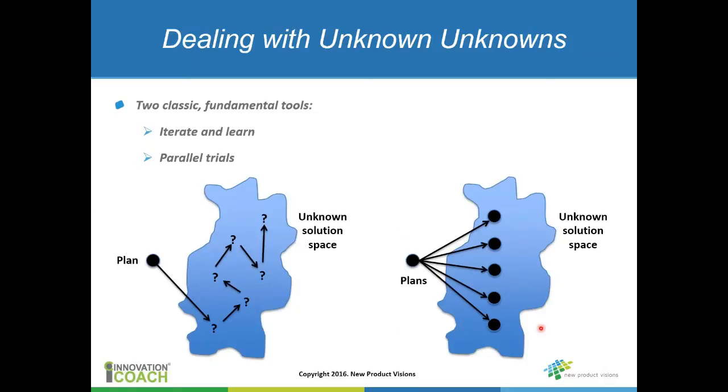The other concept is parallel trials. So rather than doing this in an iterative fashion, you run multiple experiments in parallel. Of course, the advantage is time. You can learn a lot faster, but the downside is resources. So you typically don't see this as much, especially in small to mid-sized companies, just because of the resources required to do this. So we're going to come back to these two methodologies a little bit later on in the tools section, but I wanted to at least introduce you to this concept that these really are ways that we deal with unknown unknowns.